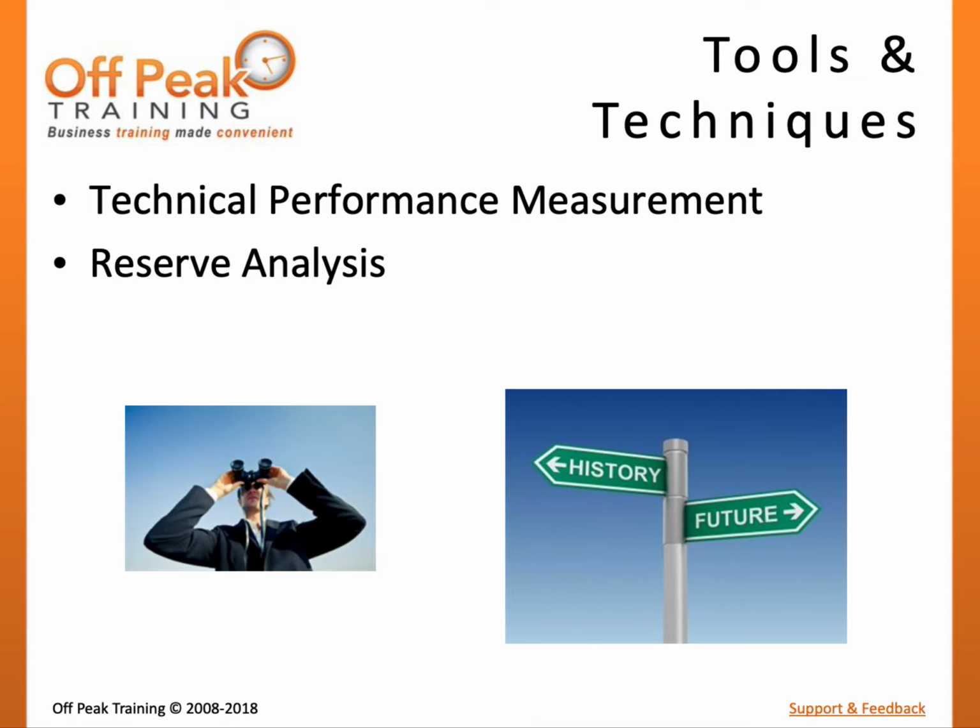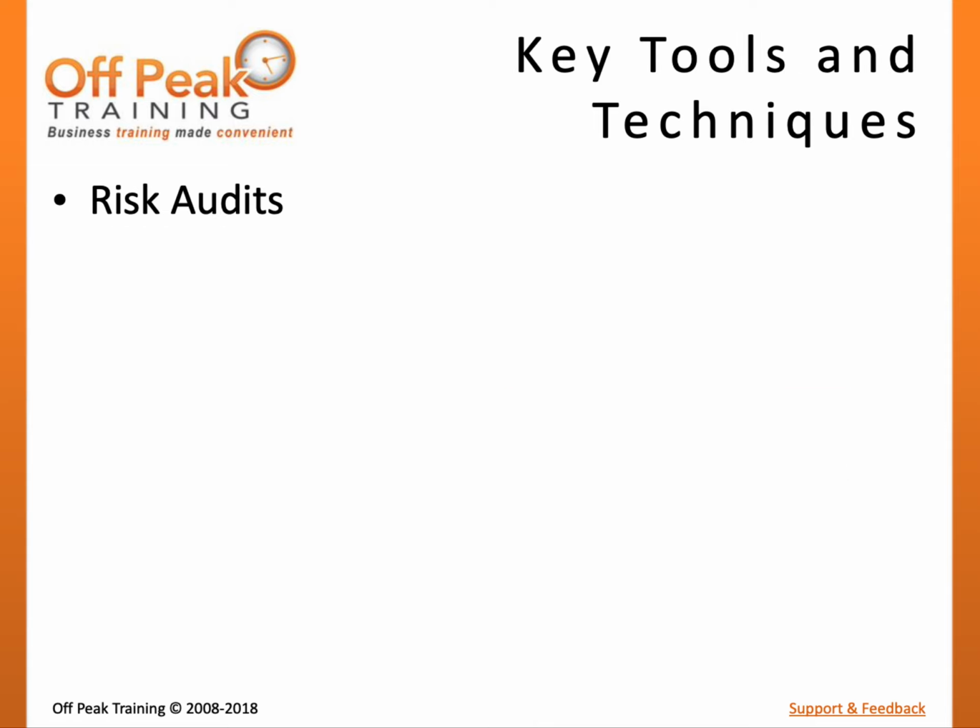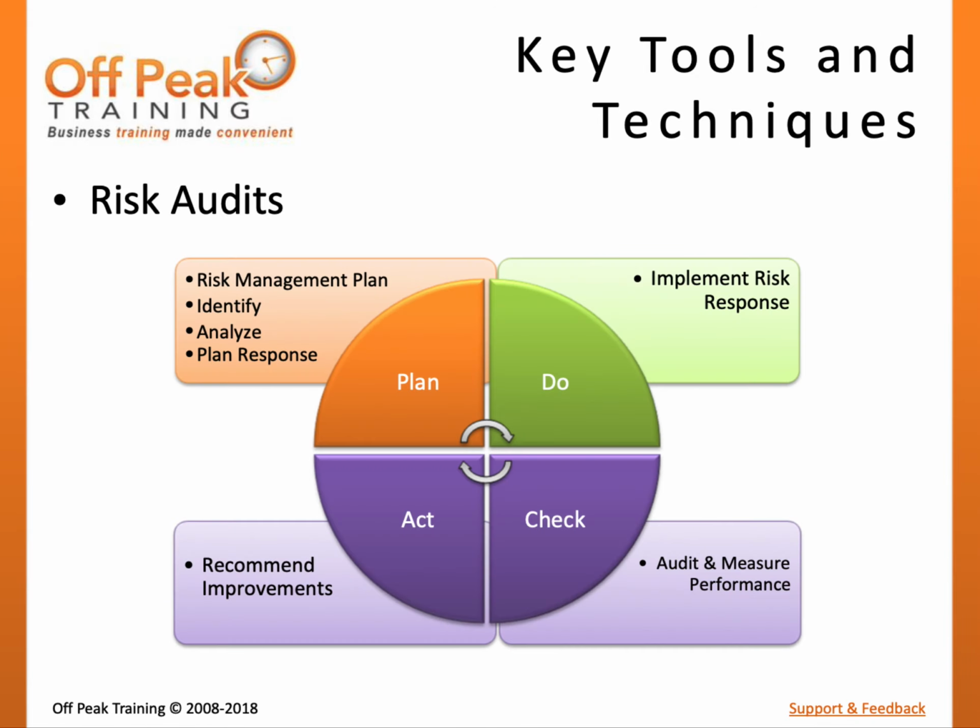Another important tool and technique is risk audits. A risk audit is an examination of the project's success and shortcomings in risk management. This may include a review of how effective risk response has been, whether the processes of risk management have been properly scaled and performed at an appropriate frequency, and how risk management can be performed better in the future.